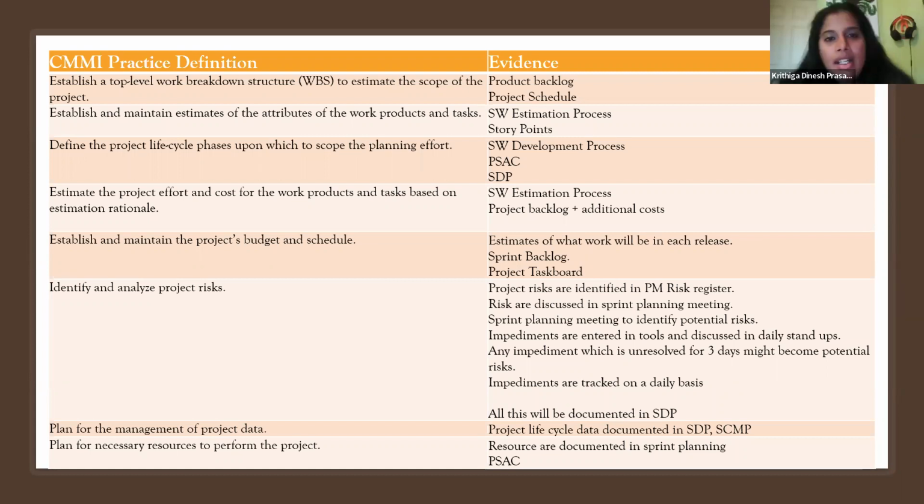And then your schedule, you can come up with a release schedule and your sprint schedule, and obviously determine the changing factor of it. Every time you get a change request, every time you have an impact, then what would the impact be on your cost and schedule? Critical for any project planning process and project management process. So we can maintain a PM risk register, and the other day-to-day risk of the project.